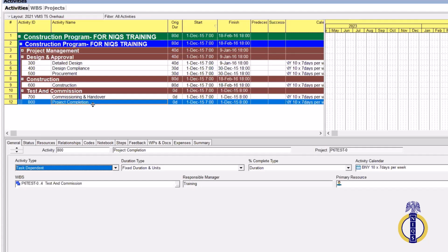That's different in Microsoft Project. In Microsoft Project, a milestone is represented as zero duration, it ends there, but it will have start and finish dates. If you assign a resource to it, it will carry it. So those are the lapses, the loopholes in Microsoft Project. But in Primavera, it's not the way it is, right?